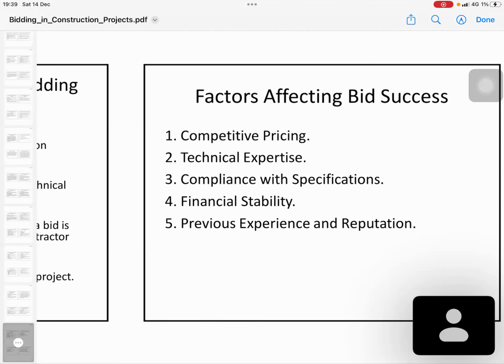We needed extra scaffolding in some areas, like a deep slope, where you need additional supporting for the scaffolding. So likewise, you need technical expertise, and it's also very important that you do a site visit before you are pricing.